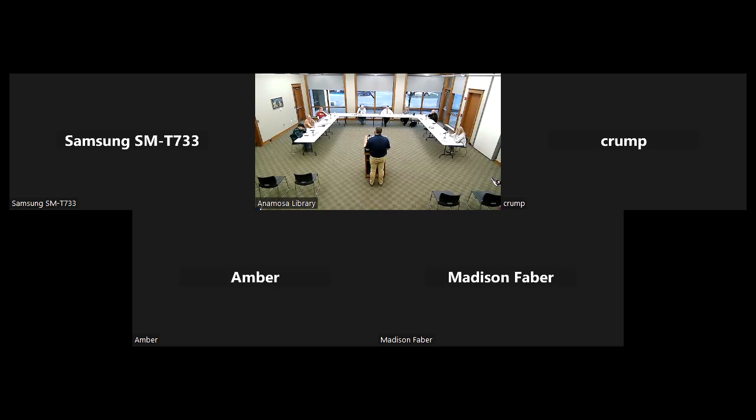And I guess my other question is, typically don't we do borings in projects like this just to determine what's below grade? Yes, in this instance, okay, so are you referring specifically to the part by Rosemary? Yeah, so there's already existing force mains there that we did in 2007, 2008, and at that point they didn't find any rock or cobblestone. We had no reason to believe there would be.